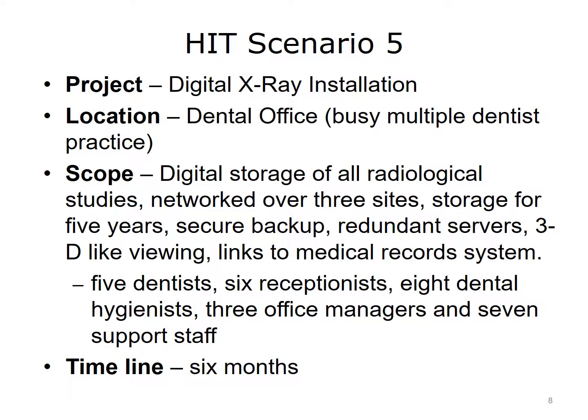The staff members will help you understand the entire workflow, while the consultant will guide you regarding the security and disaster recovery concerns, as well as the hardware and software implementation. They will also help you develop test plans so that you can check the system's functionality and security. The consultant will also oversee training and develop training documentation.